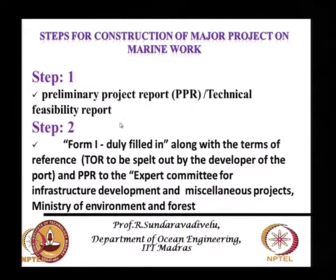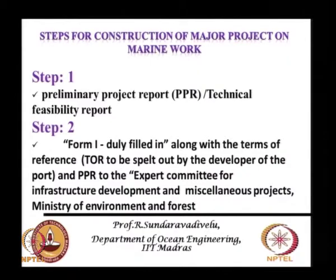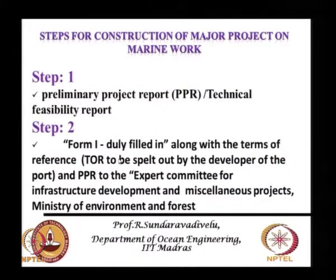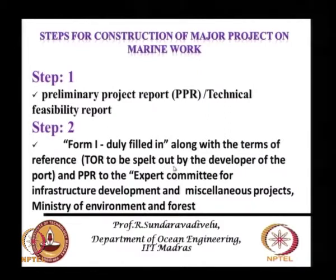Once you prepare this technical feasibility report, there is a form called Form 1. This should be filled in along with the terms of reference — meaning what are all the studies that we are going to do — and we have to enclose this preliminary project report. Then we have to submit to the expert committee and they will review this and give additional terms of reference which may have to be carried out. Then we may also have to prepare a detailed project report, along with the DPR which includes the cost estimate based on site-specific data.